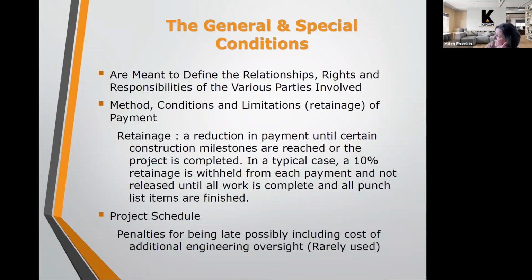Also, I want to mention retainage. When the contractor invoices the owner for the work that's being done, at the point of substantial completion of the project, when everything is done and they're invoicing for that final payment, oftentimes there is a retainage that's held until a final walkthrough can be completed with the owner and the engineer and the contractor.